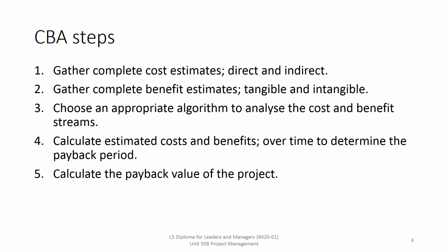So improved staff morale, better working conditions, those sort of things, we're going to have to look at those and examine things, for example, like reduced sickness and absenteeism, which we can put a cost on, less grievances and complaints, which we can put a cost on dealing with. And costing those things can help us think about how much it might be to replace those people if we had that sickness level, and then we'd reduce it so we can see a benefit in pounds, shillings and pence there, showing the age there. But we need to predict that saving, and we're going to have to use subject matter experts to get advice there.